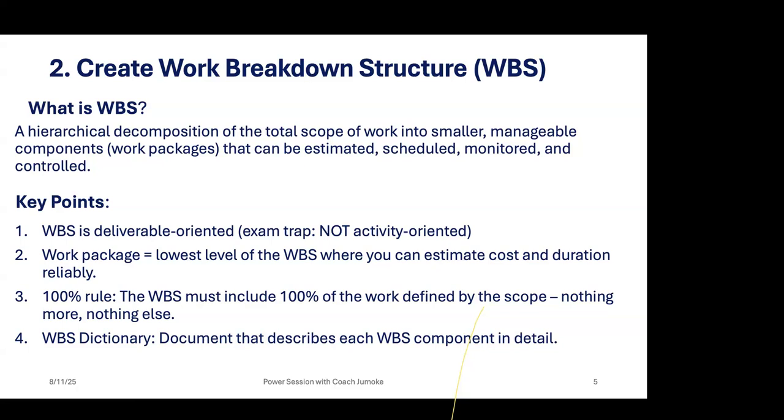Remember that I said the lowest parts of WBS are work packages, not activities. However, for the purpose of estimation, you break the work packages down into activities. But WBS is deliverable oriented, and the deliverables are the work packages.